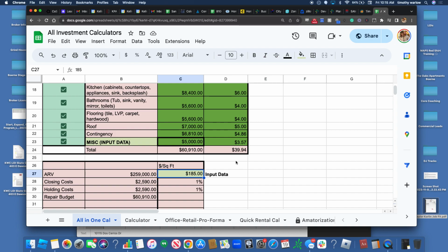Like you need an architect to come in and design it, do your plumbing, electrical, HVAC, all of that stuff. In this house in Cedar Knoll, we were outside of the city limits, and the HVAC was next to it. The plumbing was in the same room, and the electrical was literally outside that room. So we did not have to do as much work to add all of those elements. If it wasn't like that, it would have probably around doubled our cost and our timeline. But everything was right there.